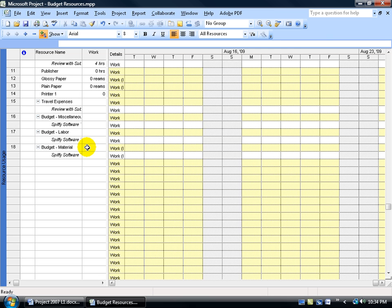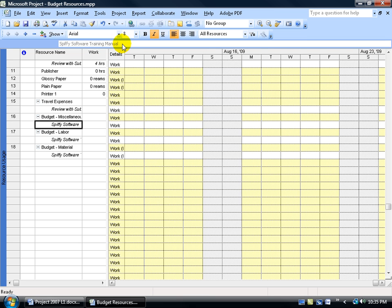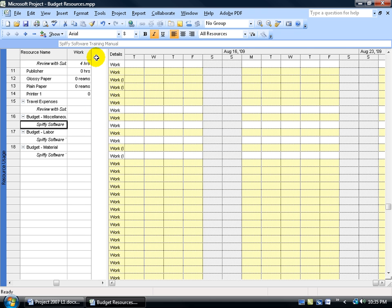What tasks are these budget resources assigned to? The project summary task — Spiffy's Software Training Manual. Now that I have my budgets listed, how do I enter in the values for cost, labor, and materials? You cannot enter it in the work field because it's not work, it's a budget. There are no additional fields visible, so we need to insert additional fields — we need to insert the budget cost field and the budget work field, which will allow entry of hours for labor and units for materials.